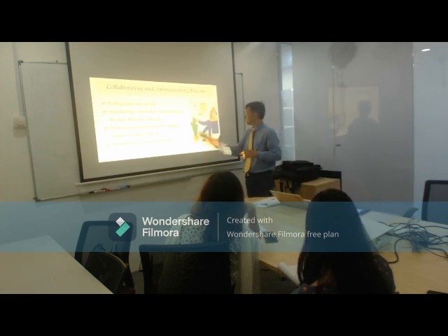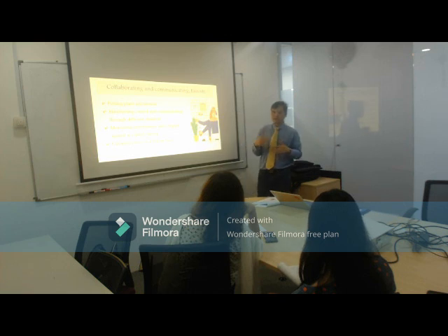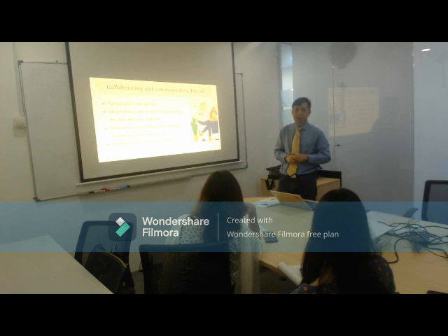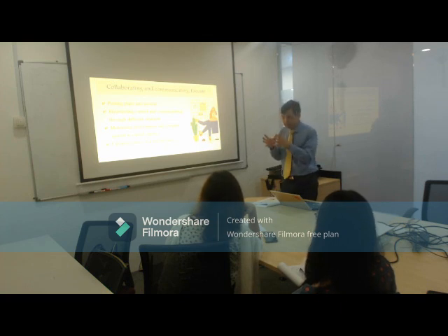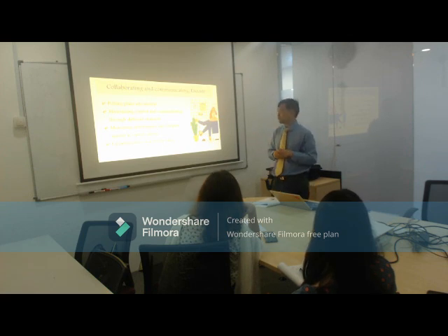My project manager, that's her assistant. Yeah. She's trying to get all these things started. She's got to go and speak to the people who are providing the paint to make sure that they have the correct paint code, and whether they can deliver the correct required amount on time. So she has to check that.